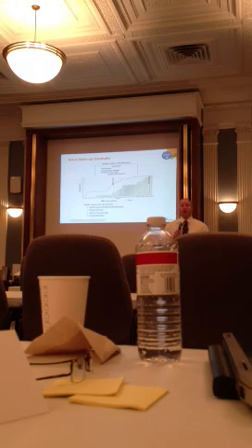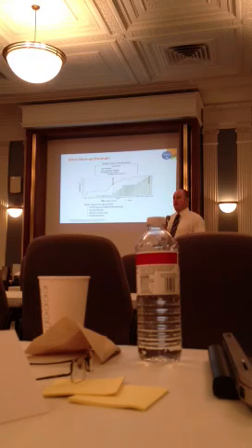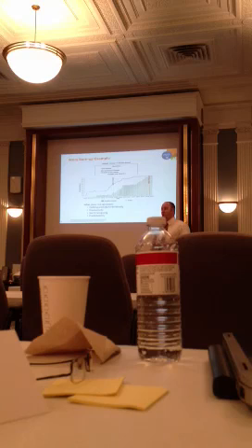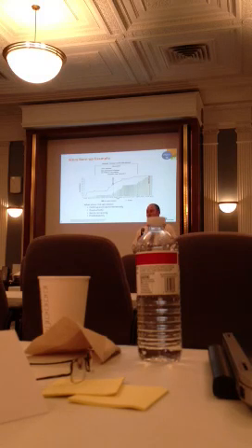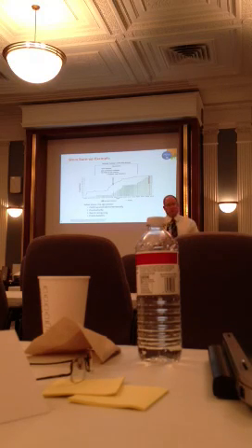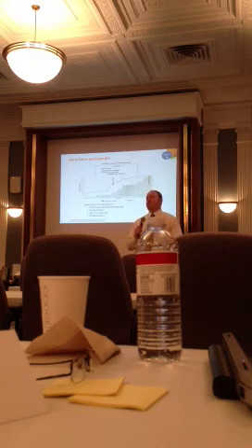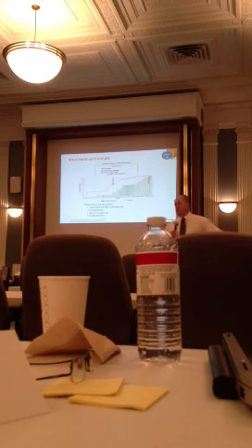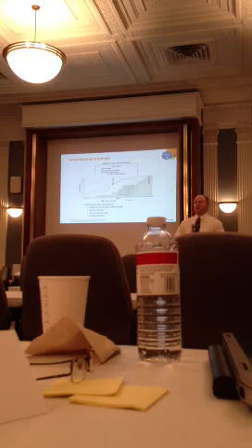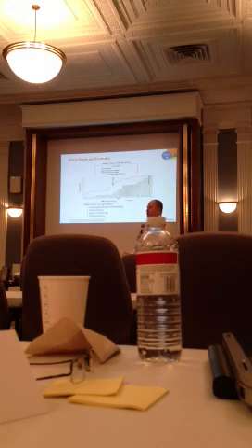So for a period of a week, our team did nothing but brainstorm and research potential solutions to that problem, because if I don't find it, this project is dead. We found a couple of potential solutions and presented both back to the client. The client liked both of them, and they became user stories that we implemented, and the project got to go on.